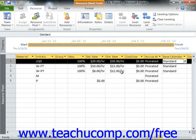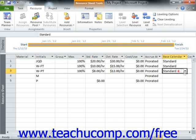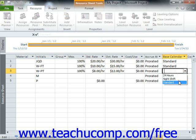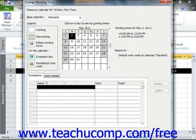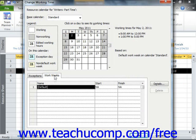Now if you need to enter a custom work week for a selected resource, you can also do that as well. In the Change Working Time dialog box, click the Work Weeks tab. Note that the value of Default is shown within the first row on this tab. This value indicates that the default working time from the base calendar selected is to be used for task scheduling for this work resource.